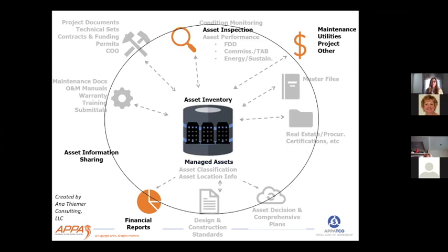So sometimes I'm joining them by key codes, like HVAC, AHU, the AC unit. I'm going in and saying, if it has any of these things in the title, I want to join it with this one over here. So it's a very manual process, but we've been able to collect that information and data into a predictive analysis of how much money we need, which is how we've garnered that additional funding.